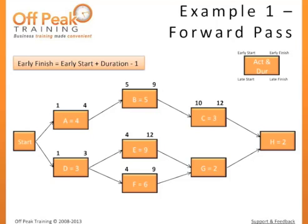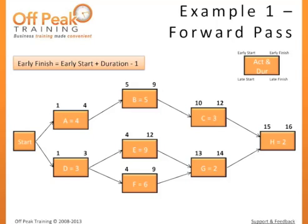Task G has two predecessors. Since both must be complete before G can begin, we will use the later of the two early finishes. So G's early start will be day 13. Using our formula, 13 plus 2 minus 1, the early finish is 14. Now we are ready to find the early start for H. H also has two predecessors, so its earliest start will be the beginning of the 15th day. Using our formula, 15 plus 2 minus 1, the early finish is the end of the 16th day. We have now completed our forward pass. The earliest we can possibly finish the project is the end of the 16th day.